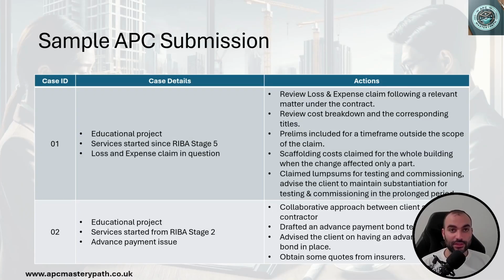And here in level 3, that's where you're going to take your doing up a notch towards the advising. So you wouldn't be just compiling contract documentations and having a look at the works done on site evaluations, but you are going to be receiving documents from contractors. For example, loss and expense claims, extension of time claims, even normal change orders for the scope of works, and then you're going to be scrutinizing these change orders. You're going to be questioning and challenging the grounds of them and see if there are grounds for these claims under the contract clauses. And then you're going to have a conversation back and forth with the contractor to agree on the costs, and then you're going to be involving the client also in this conversation.